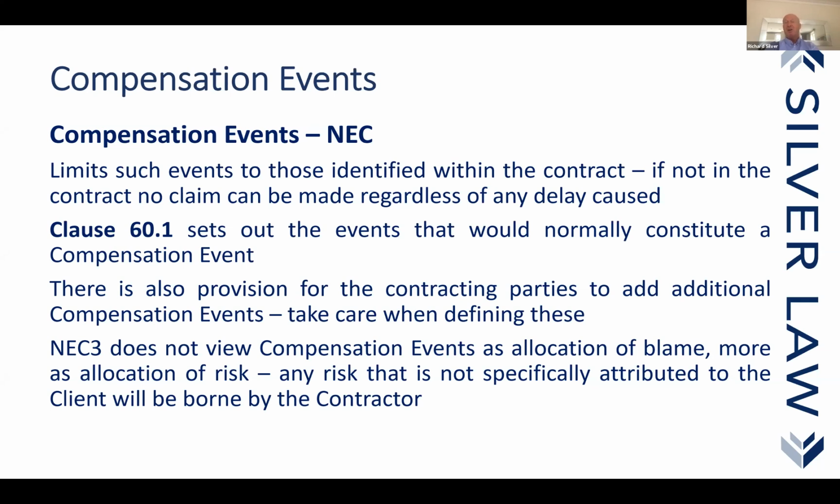But there are options for adding further compensation events, or dare I say it, in option Z, there are options for deleting some of those compensation events. Indeed, that quite often happens. So do be aware, option Z is an opportunity for the employer to amend the contract. And it will come as no surprise that option Z is often very long.